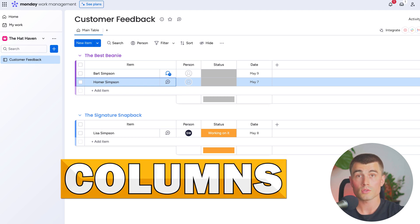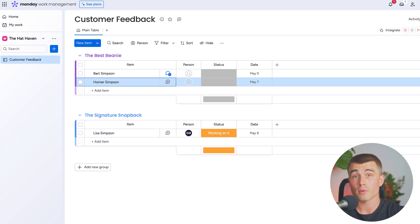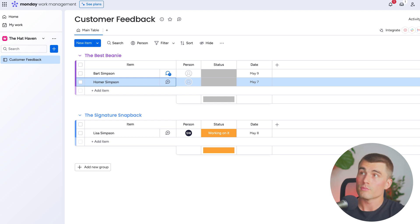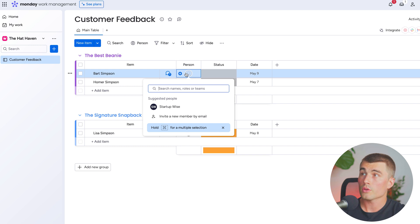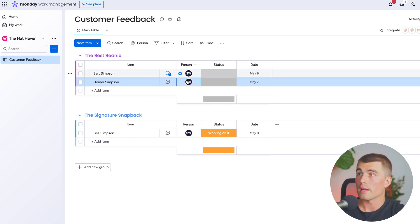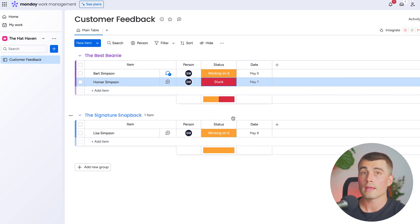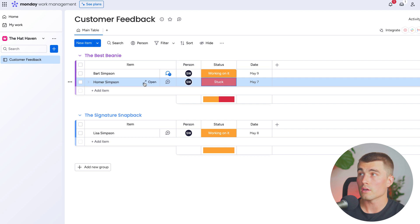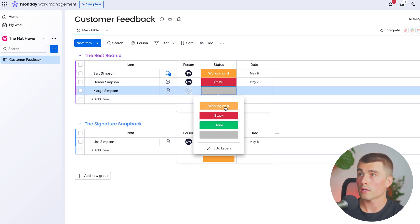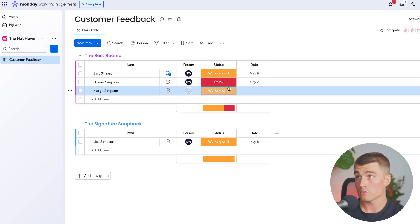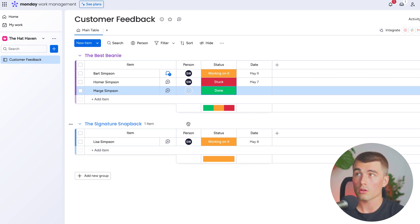Lastly in our monday.com hierarchy we have columns. In this example we can select different employees who are going to be responsible for this customer, as well as a status column to see the status of the customer's feedback — if we've reached out to them, if they had an issue, and so on. We can see there's already a column for person. Once you have your team members inside of monday.com, you can search for that specific person. For status, we'll select 'working on it' for one and 'stuck' for another. Something really cool about monday.com is the visual chart at the bottom showing the overall status of each item within a group. If we add another item and select 'working on it,' you can see two thirds of the aggregation is orange because two out of three are orange. It's a really helpful way to visualize the status of all your items within a specific group.